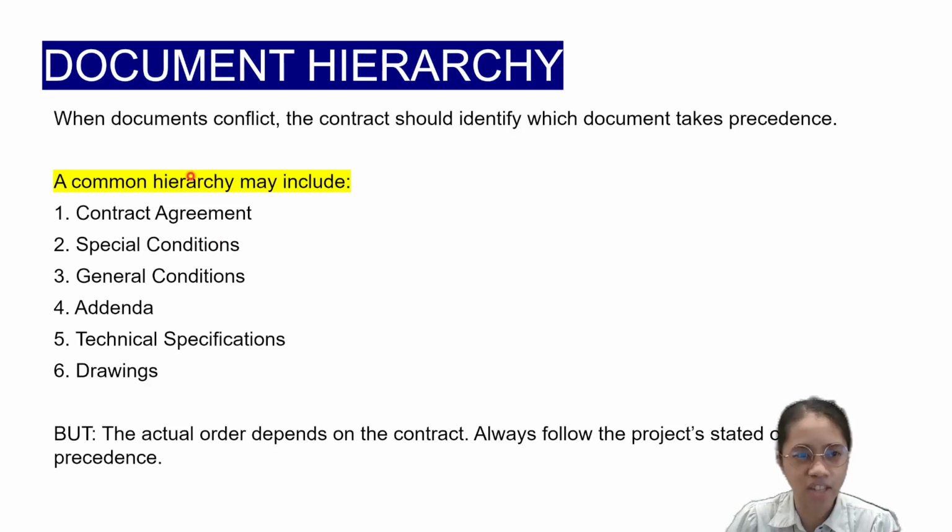This is in case documents conflict, the contract should identify which document takes precedence, which will govern. Okay?